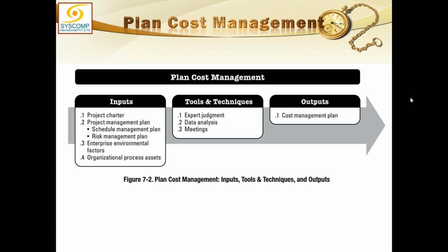So what all you need to know in the cost management plan? You have to establish certain rationales. How are you going to be measuring the cost? What are the units of measure for the cost? It is just like you are measuring distance in kilometers or meters or feet or whatever. Similarly, you must ascertain what currency or what unit you are using for measurement of the cost. Then what is the level of precision? The degree to which the activity cost estimate will be rounded up or down, right? You may be aware that normally we round it off at two digits.